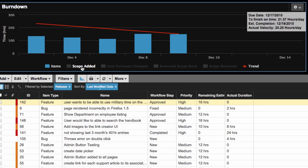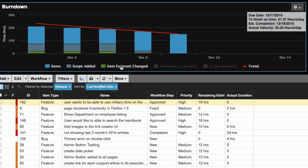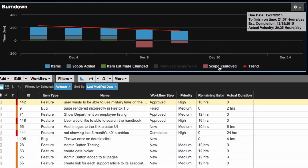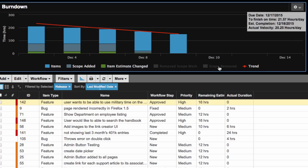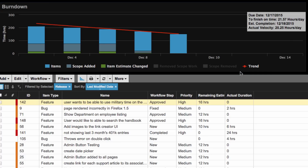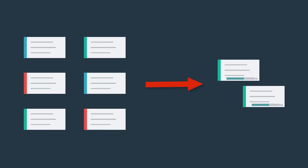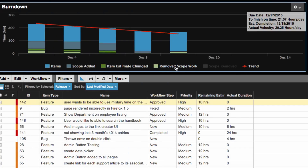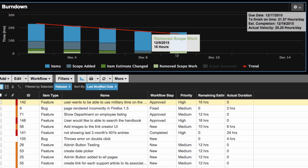These changes make it so that your velocity is based on the work logs your team enters and is unchanged when you are adding or removing scope. If you remove items that were worked on during the sprint, then the burndown chart will introduce yet another series that will show you the work that was performed for items that were later removed.